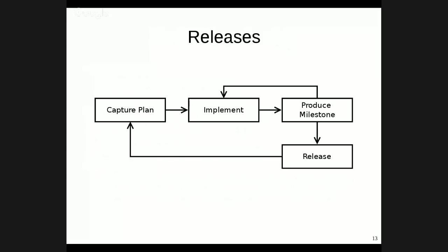Projects that participate in the simultaneous release, for example, many of them release only once a year. And in that case, having many milestone builds is very important. If your project decides that they're going to do releases much more frequently, you may decide to do fewer milestones. The eGit project, for example, did 6-week release periods for a little while. As they've grown more stable, the need to do that frequent a release has diminished.